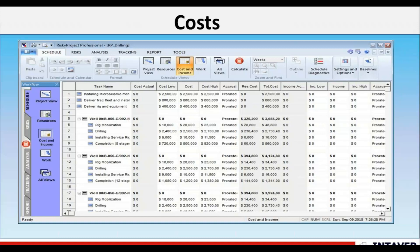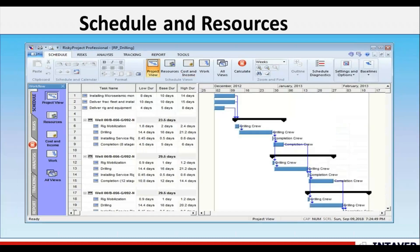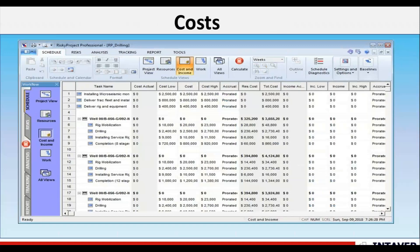We have a schedule with resources. It's a very simple one for these purposes, but you can see we've added resources — a drilling crew and completion crews — each with an hourly rate associated with them, which drives our time-dependent costs. Fixed costs are associated with specific activities and are used to model costs that are time-independent, meaning they are not affected by how long the activity takes place. These costs can also be risks as part of the analysis.